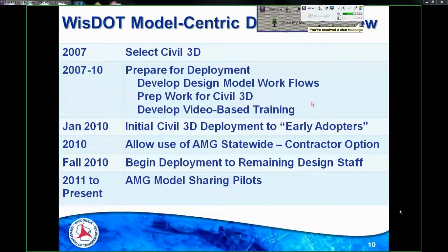Okay? You design the model first, then you cut cross sections on your model. You don't work in the corridor and design cross sections like we used to with some of our old design tools. It sounds like I'm just playing with words there, but it's really a big deal. And every project we had in our pilot program that was not able to successfully deliver models, that was the core reason. Sometimes it might have been delivery pressure. You're running out of time. PS&E date's coming up. You skip some processes.